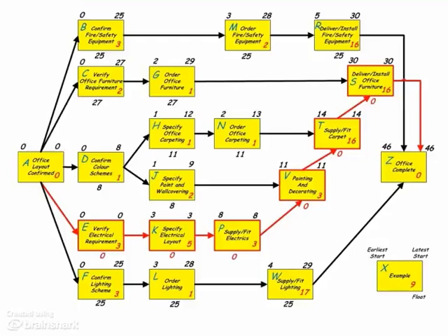Since this map is to communicate to everyone what the plan is and what needs to be given time, attention and resources, I've highlighted the critical path, and this is what's on my wall. I've photographed it and sent it to everyone that needs to know, particularly facilities. I've got to make sure that there are no delays here, but I've also got to look and see what risks might arise along this path. These risks will become some of the highest priorities if we don't want to be late. So when I'm planning to mitigate risks, I'll pay particular attention to these. Time for another coffee.